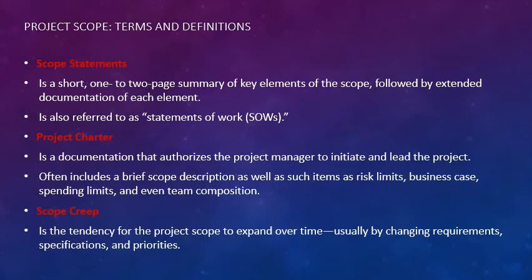The project charter is a document that authorizes the project manager to initiate and lead the project, and it includes the scope as well as risk limits, the business case, spending limits, and even team composition, so that the project managers going in know what framework they're working in.